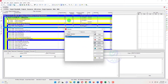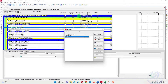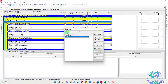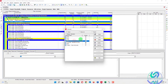But if we change the calendar to calendar days and stop displaying working days, there will be a big mess — all the planned budget units and planned durations will be wrong. Off days, public holidays, and weekends will show activities finishing or starting, giving a totally wrong critical path and totally wrong start and finish dates.